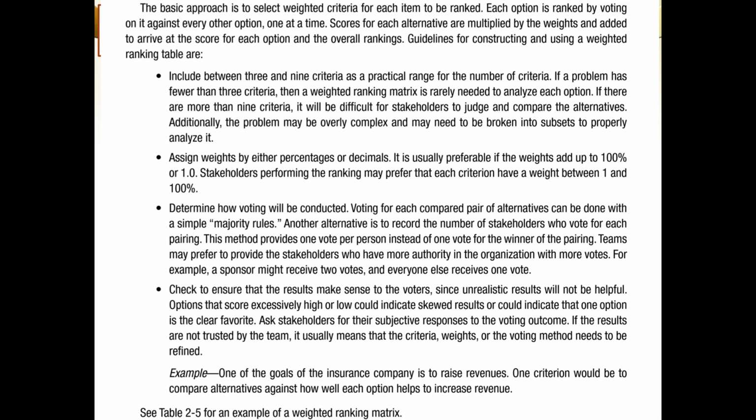So let us see, you are looking at say five different variables. Maybe how much time it will take, cost or something else, whatever. So time may be most important to you, so you have given it five times the weightage of a single unit. Cost may have two times the weightage. Quality may have one times the weightage or whatever. I'm just naming a few things, but it depends upon what variables you are using. You are not exactly going to be using scope, time and cost, but I am just naming them as the variables. So every variable should be assigned a weightage according to your need.